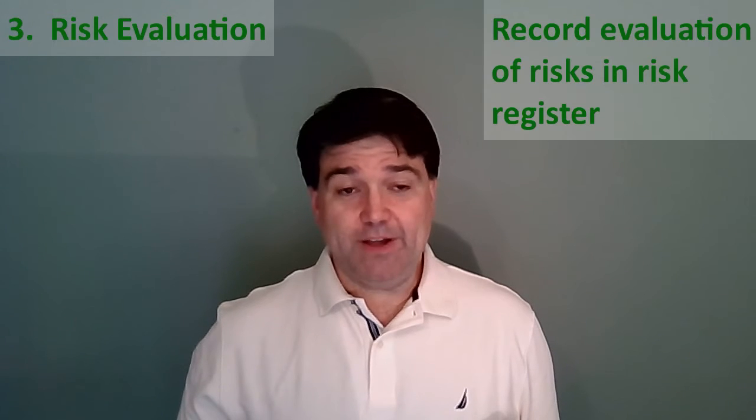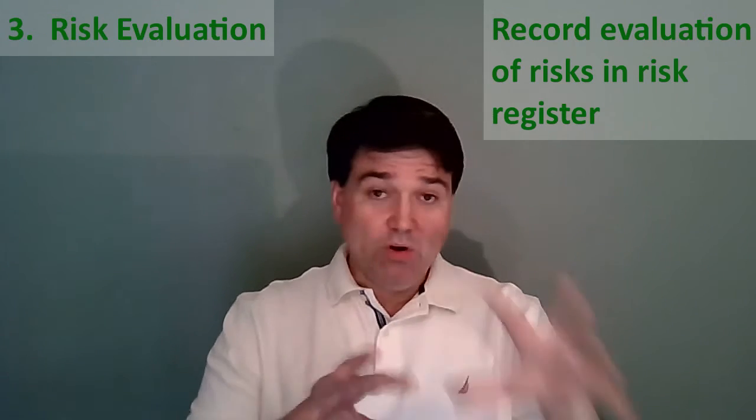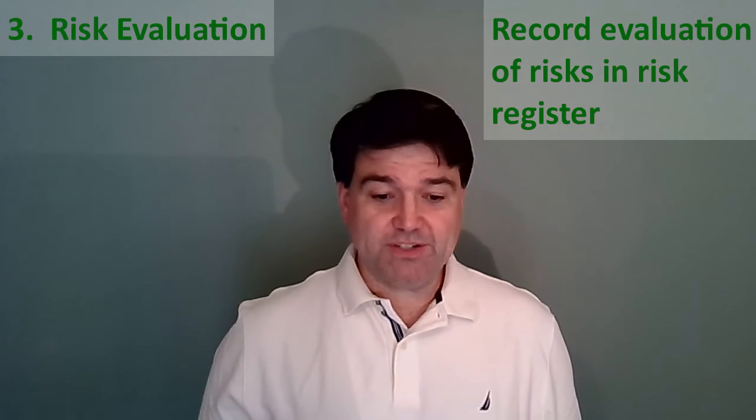The third step is risk evaluation. And this is where we take those risks that we've identified and we evaluate them using the step 1 process of our evaluation metric of cost and schedule impacts. And we record all that in the risk register also.